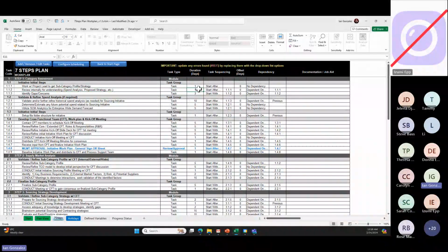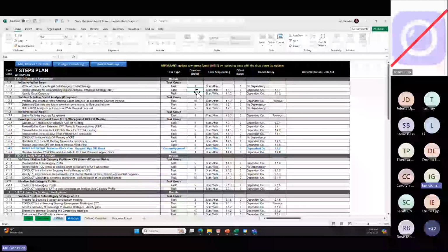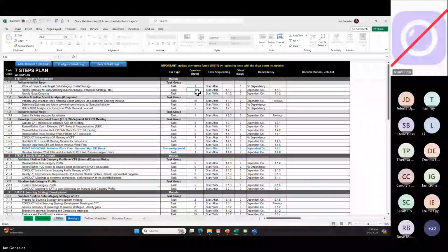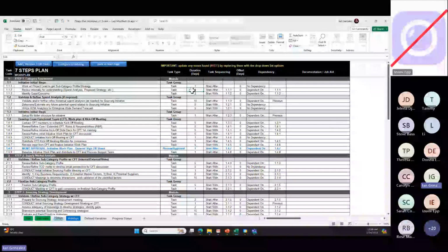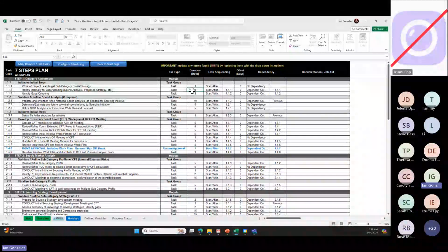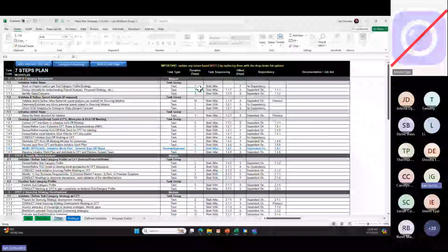It takes 1 business day, so that's what duration means, okay? Business day. This tool is smart enough not to schedule anything on weekends and even Canadian stat holidays, right? It will not assign an approval step on Canada Day, something like that. So when it says duration, just how many business days would it typically take you to do that step, okay?